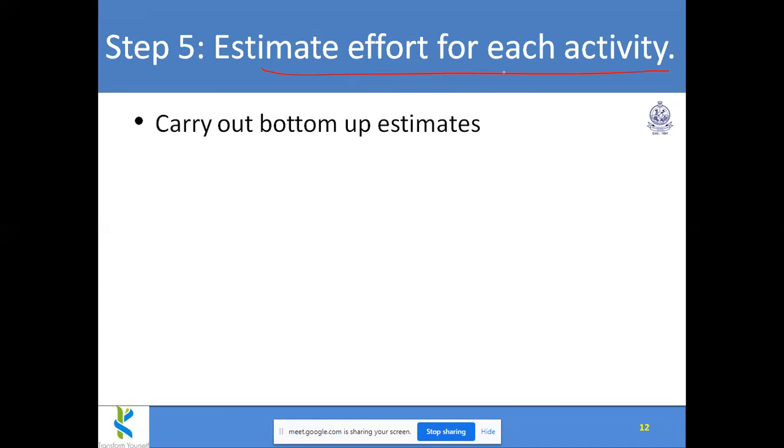Then you make a split-up from that. In that 30 lakhs, 5 lakhs is for this, another 5 lakhs is for this, another 5 lakhs is for this. Likewise, that is top-down. And from the beginning, you could do it like: for purchasing bricks, this much amount; for purchasing sand, this much; for purchasing cement, this much; the labor charges, this much.